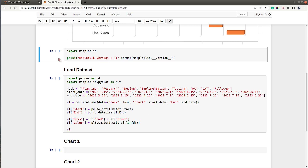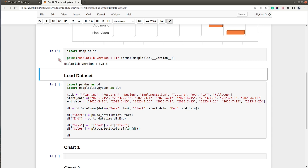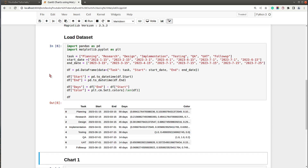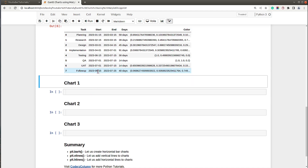First of all I imported the library matplotlib and printed the current version which is installed on my system — this is the latest stable version. Now in order to create a Gantt chart we need some data, so I have created a sample dataset for our purpose. The dataset is loaded as a pandas DataFrame and it has columns named task, start, end, days, and color. Task is the project task, start is the start date, end is the end date, days is the number of days it took to complete the task, and color is the color we will use to represent that task in our Gantt chart. I have converted the date strings to datetime, calculated days by subtracting start from end, and used the colormap Set1 from matplotlib to select various colors.